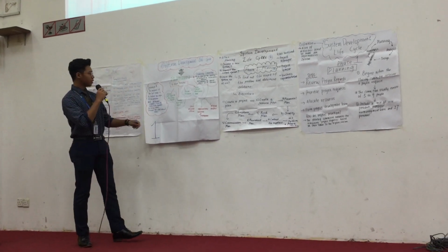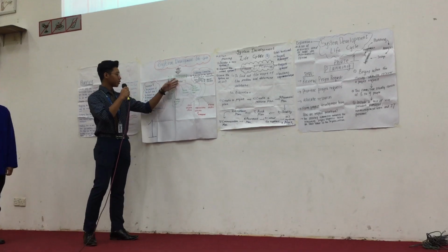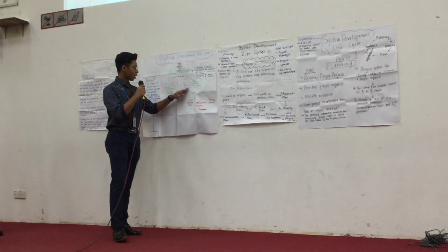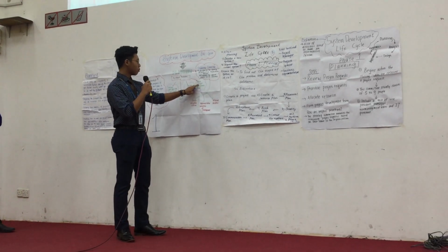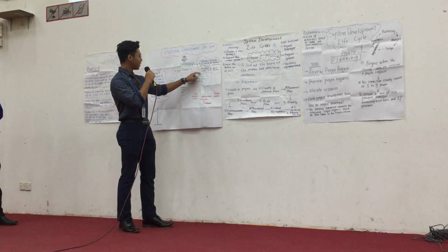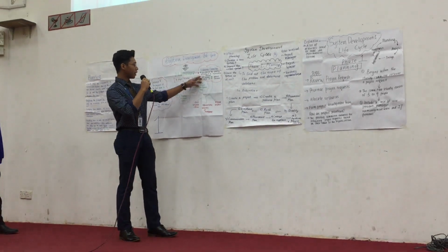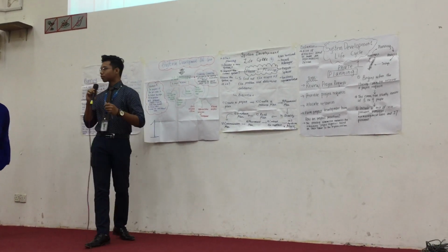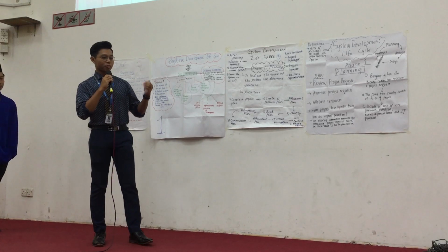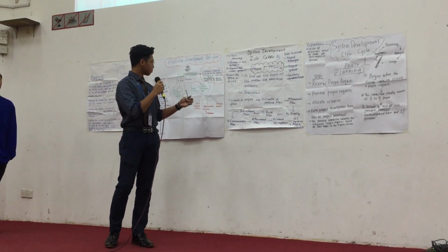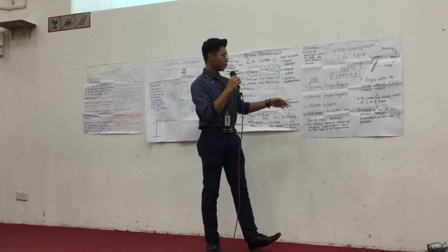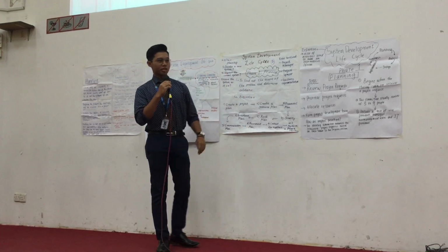So in conclusion, the four major activities of planning are review and approve the project request, prioritize the project request, allocate resources, and form a project development team. Usually this is done by the steering committee. Okay, the steering committee involves people starting from the vice president, managers, until the users.